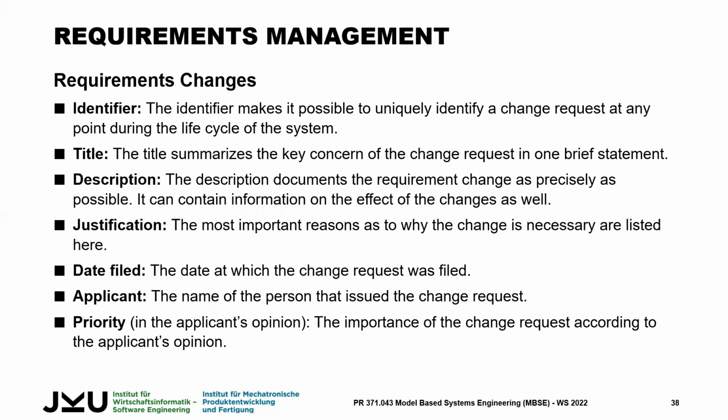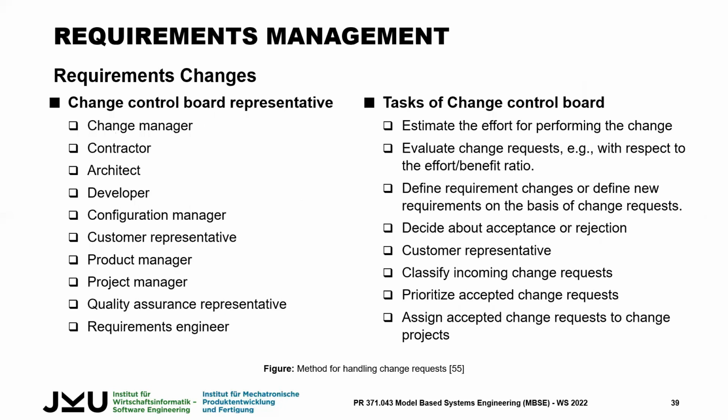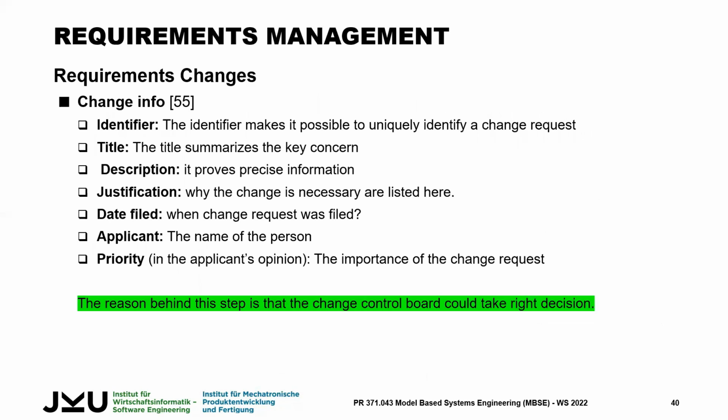And here is the description. I'm not going to describe it, it is self-explanatory. And if you want to change the requirements, then you need to create a change board who will approve those requirement changes, and they will also evaluate the requirement changes and the impact of the change. Yeah, so this is just a small